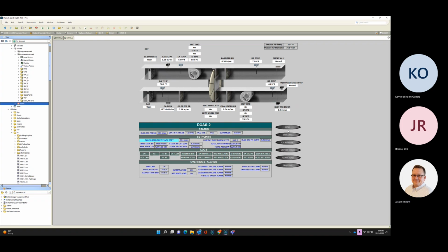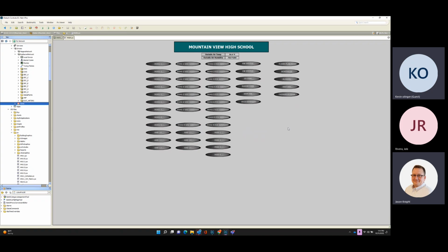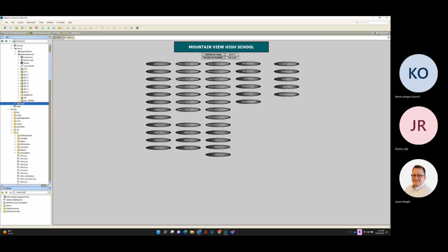Okay. So speaking of that, on this main page, what I'll do is I'll put a button up here with a PDF of our as-builts when they're done. And then that PDF will show each one of your floor plans and how we pulled the communication wire, where the router is located, and give you all that as-built information.